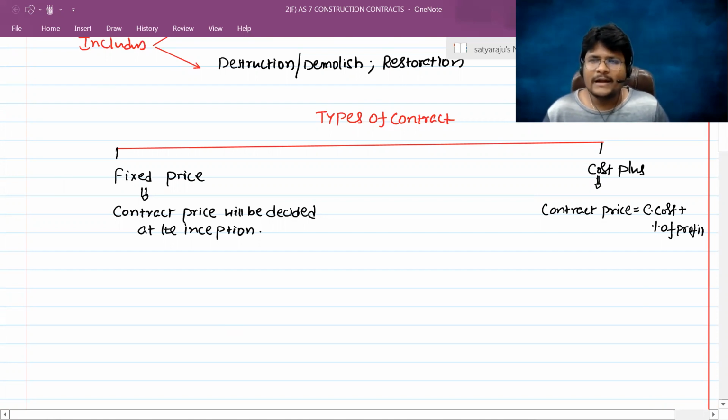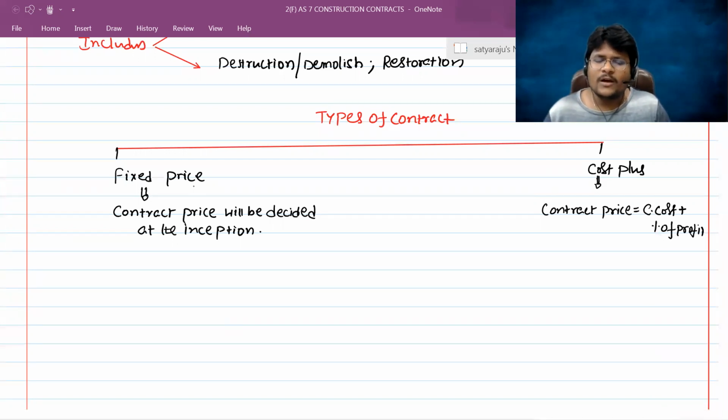And one more thing I am asking you, I hope you already know about escalation clauses. You already learned them in a separate paper, which is in costing, I think paper number 3 in your group 1. Escalation clauses means if at any point of time there is an increase in the raw material cost or labor cost, then the customer will reimburse such amount to the extent of the increase in the prices. Up to some extent there is no need to reimburse, but if such prices increase above that, then as per the clause mentioned in the contract, the customer should compensate such amount to the contractor.